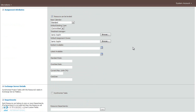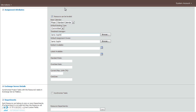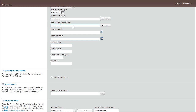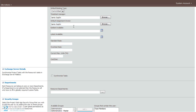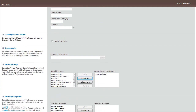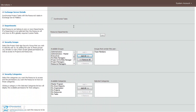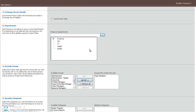Other attributes you can assign for this user include whether or not this user can be leveled, the user's base calendar, and booking type. Timesheet manager defines who approves a user's timesheet. In this case, we're going to make Janice her own timesheet manager. If you were to change this to another user, that user would be submitted Janice's timesheets for approval. There are also default assignment user options, standard rate, Exchange server task synchronization, and resource departments if you've filled out the departments table.